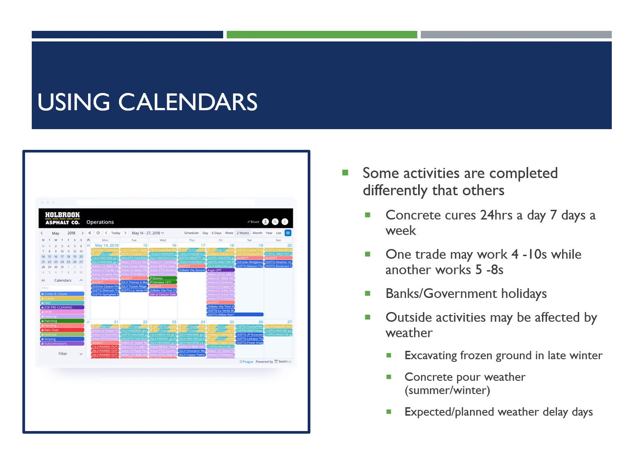So if we have an event that needs to take place after concrete is cured, we're not sitting there scratching our heads trying to think of, well, how many hours is that? It's because we've got an 8-hour, 5-day-a-week calendar, and they poured on a Saturday. What's 28 days later? It's not worth trying to sit there and figure it out when you just build a calendar that says all hours are work days.